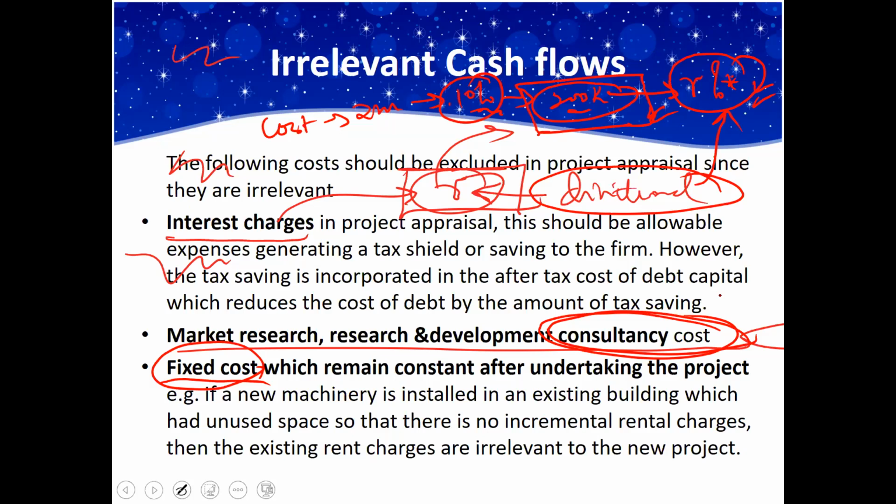What that implies, therefore, is we don't need to subtract them among the cash flows. As you find the cash flow for year 1, year 2, year 3, you don't need to include them there. Why? Because the R, the discount rate, this R% includes the interest cost and the dividend cost. Therefore, if you subtract the 200,000 here, like you're just given, then we shall be accounting for them twice.